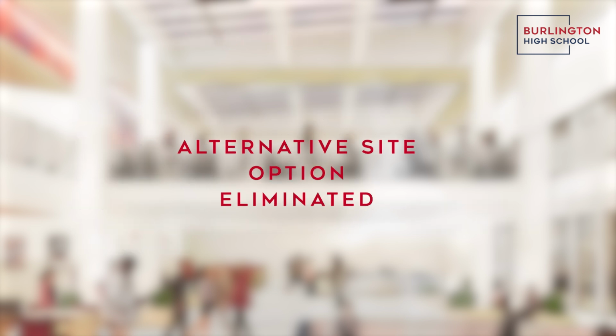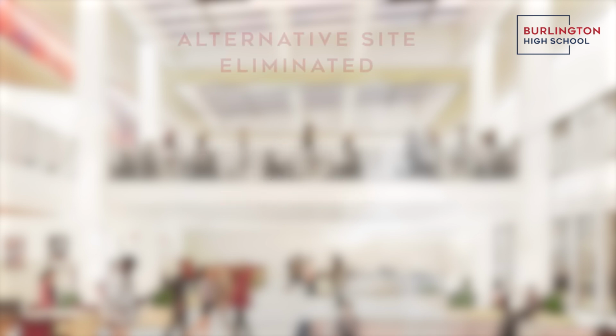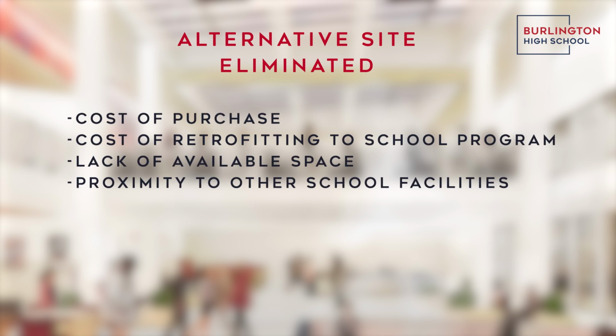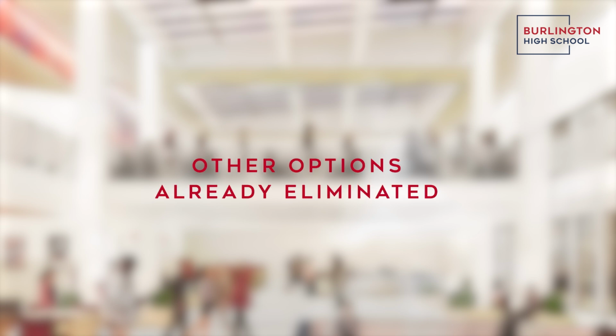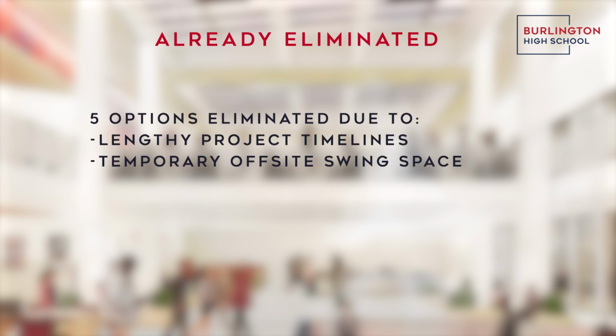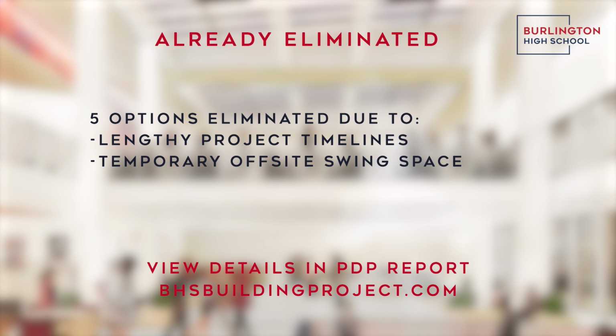The alternative site option was eliminated by the School Building Committee in January of 2025, following the submission of the PDP report. This option was removed due to the cost of the purchase and retrofitting of the building to make it ready for a learning environment, a lack of necessary space, and proximity to other school facilities. 5 other options were presented to the School Building Committee on October 10th and were also eliminated. These approaches require lengthy project timelines and temporary off-site swing space for the entire student population and faculty, which the town cannot support. These options can be viewed on the project website under PDP Appendix D.